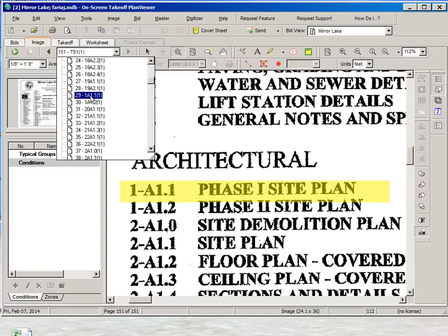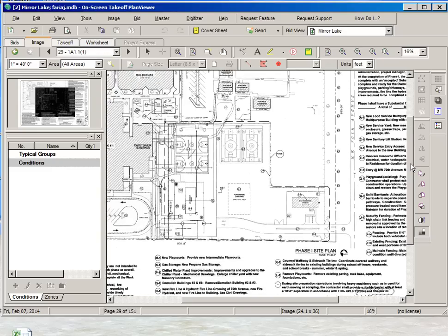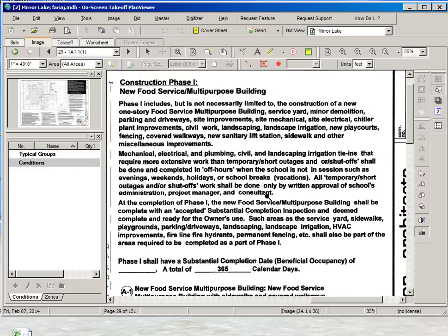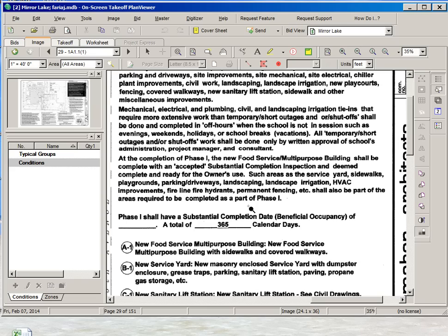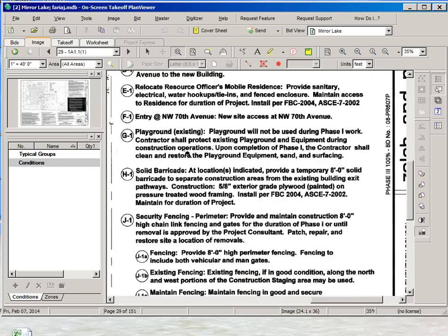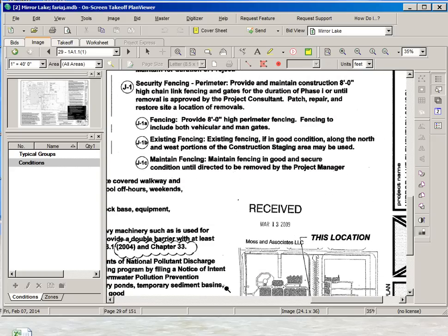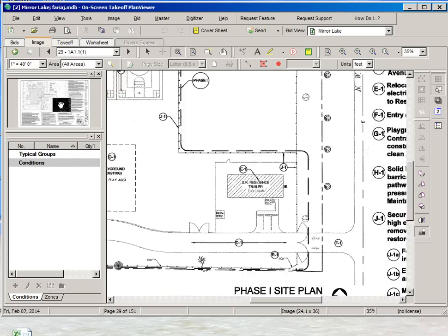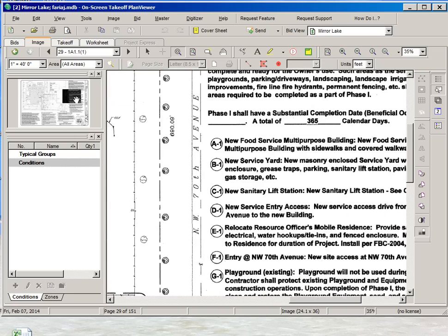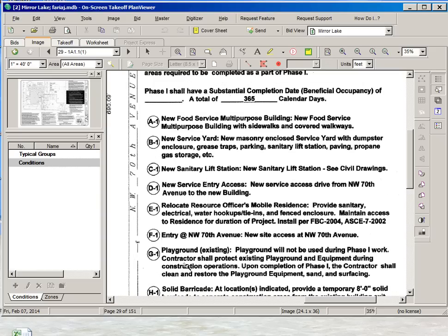It's drawing number 29, One A11. This one shows all the different sections that we have in phase one. So we have including the new one-story food multipurpose building. That's going to be the main purpose of our course. And then some minor work. So if we see they have broken down this phase one in different tasks. And then those tasks are identified in the drawing with these symbols that they match the description of the scope of work.